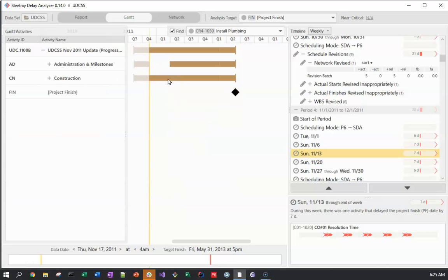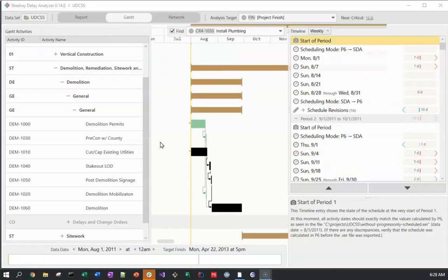One of our goals going forward is to make it easier for you to get insights just by looking at the WBS bars. We'll be moving a lot more information into this view, for example, criticality and delays, but that's for future versions. Some colors have changed. Critical used to be represented by a black border, and now it's solid black. I'll change near critical to be 10 days, and we can see that near critical is half black, half green.